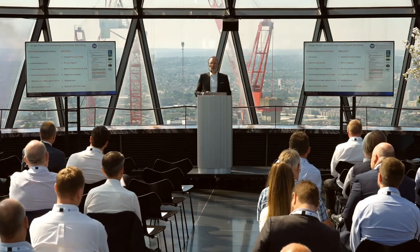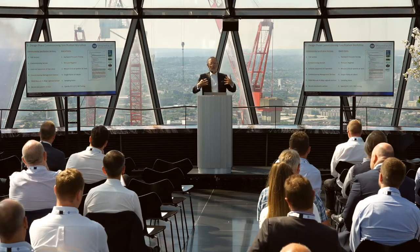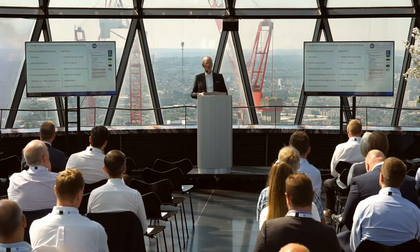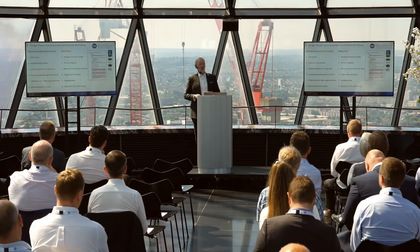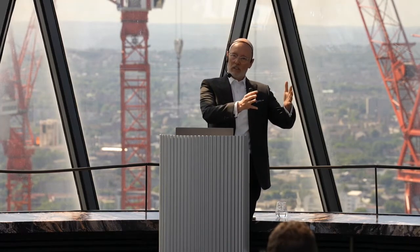Commissioning specification workshop, right? So if you are involved in the design phase, you have the ability to review the specs and make sure everything's in there or not. So probably 50, 60% of the specs I see are horrific copy and paste jobs going back to the 70s and 80s. They don't cover water treatment properly, they don't cover mission critical systems, they don't cover factory acceptance testing, so all that needs to go in. This is not a big job, this is one day's work, just to review the specs and make sure everything's in there, or not, consistent with the design brief and the type of building and how mission critical it is, right?